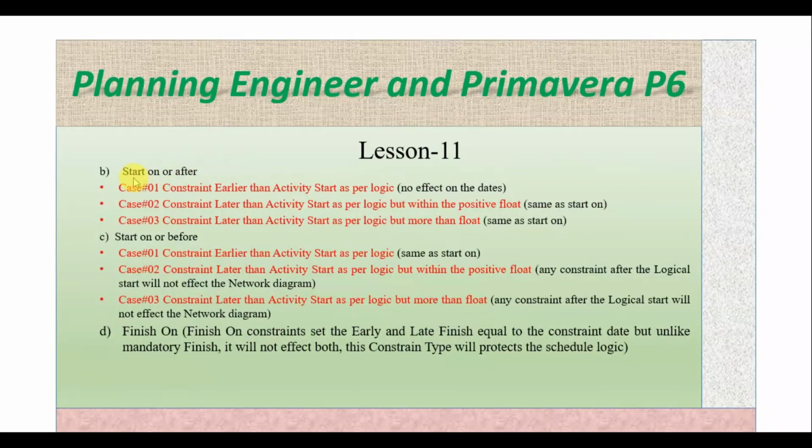Now another constraint type is Start On or After. Here in case 1, when we are keeping the constraint earlier than the activity start as per the logic, there will be no effect on the dates, so the start and finish dates will not be changed.